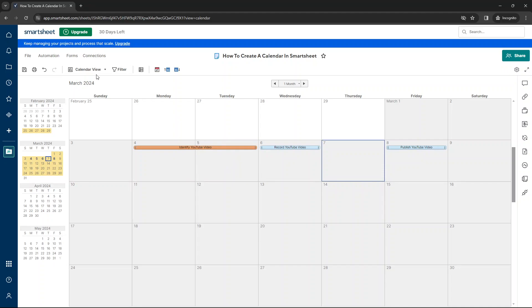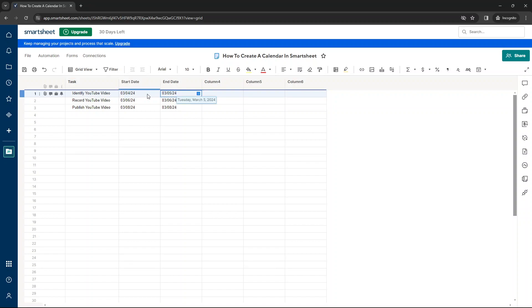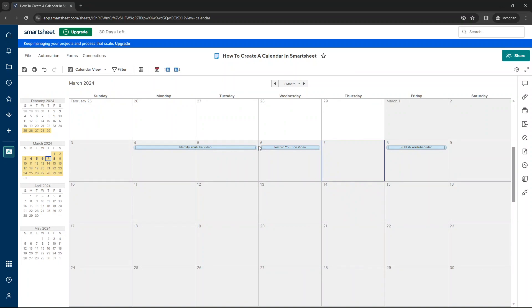And if I was to go back to the grid view, you'll notice that the end date has been pushed back a day because it's going to take two days to do so. If we had a duration column, that would go from one to two. So that's really, really good. Once you set up your calendar, you can start to manipulate it accordingly.